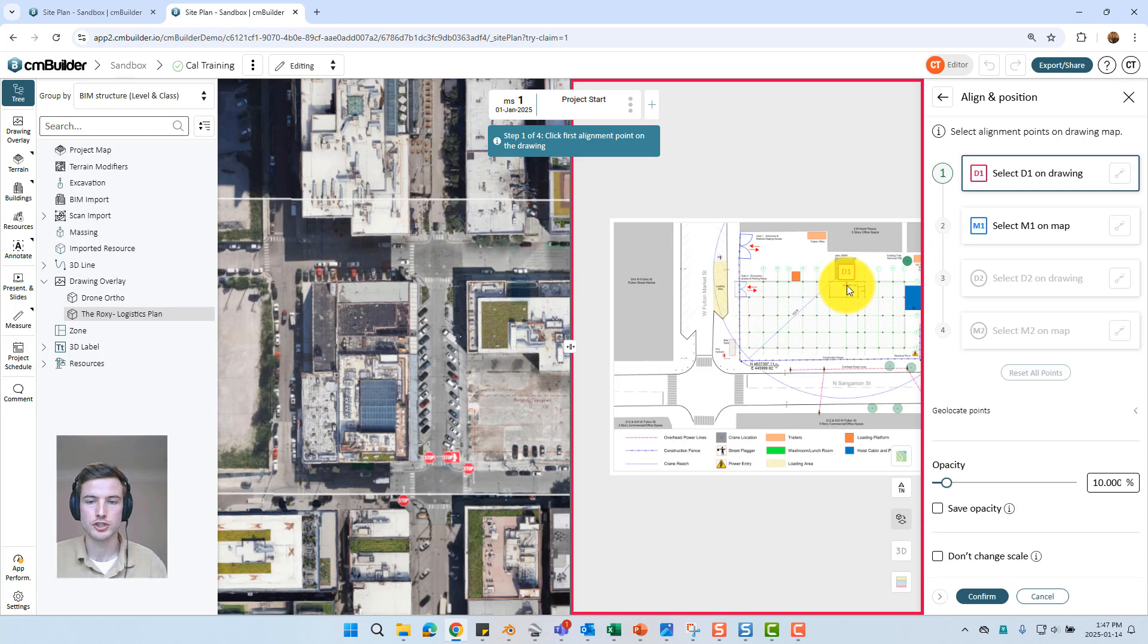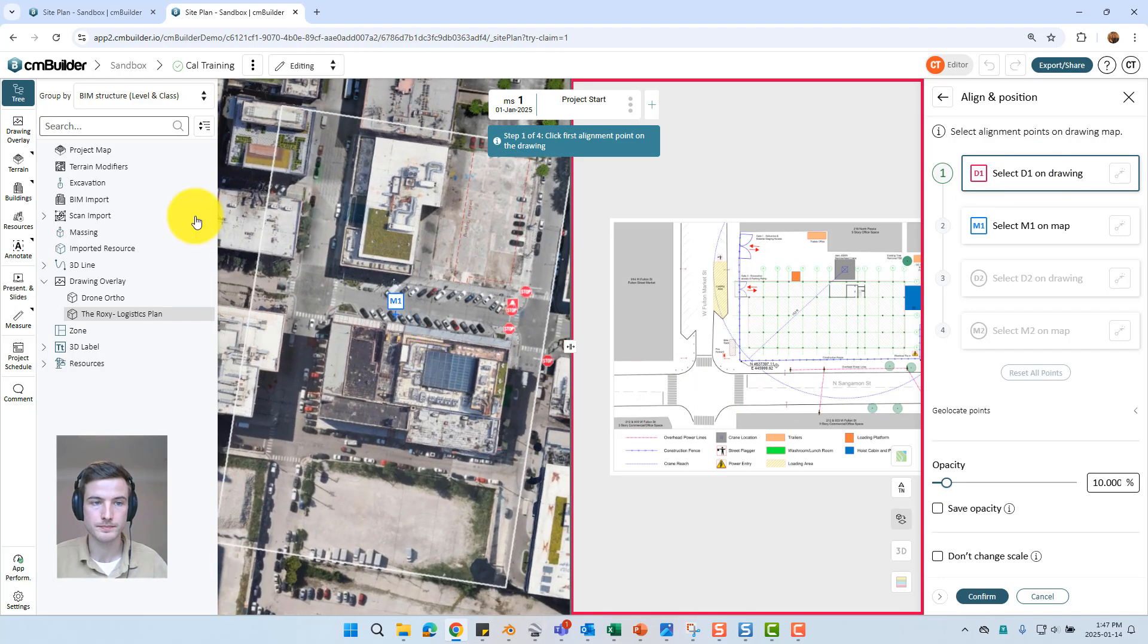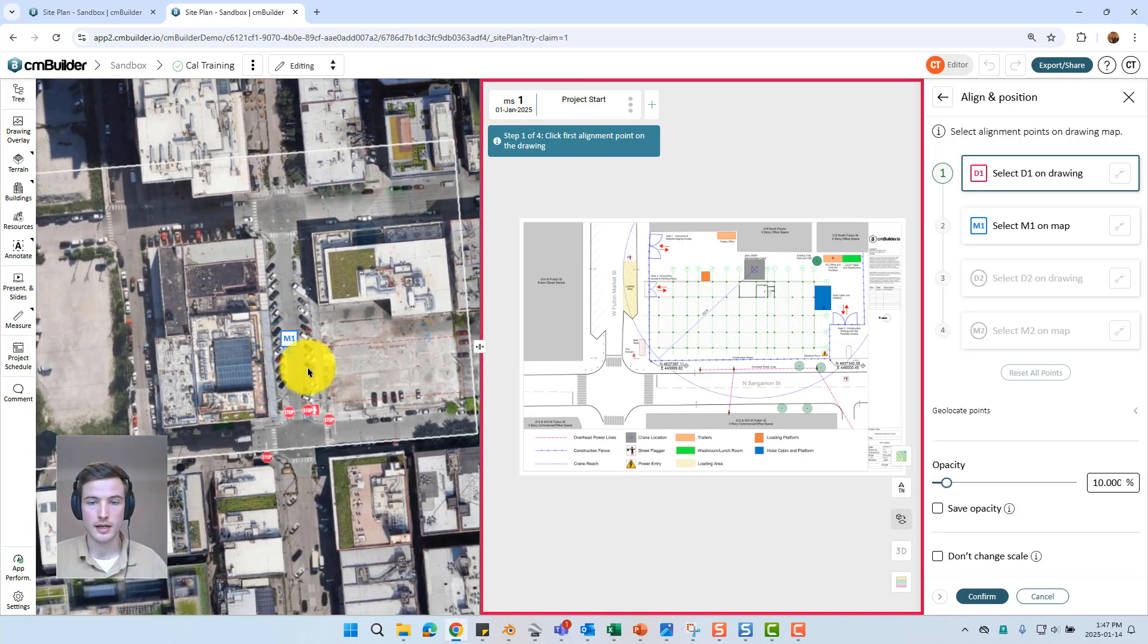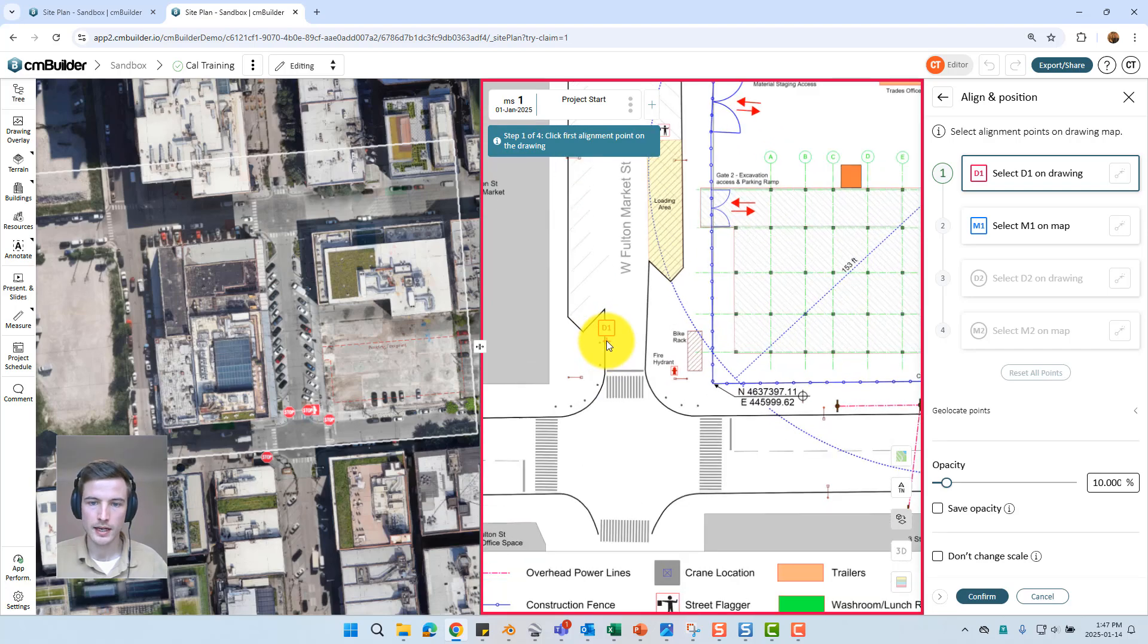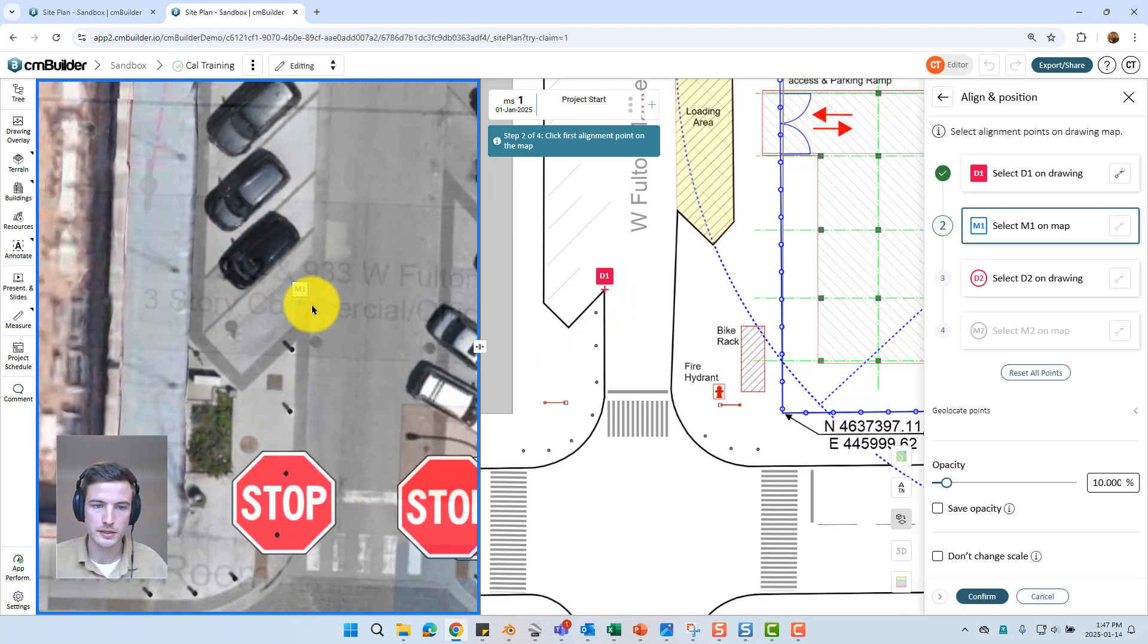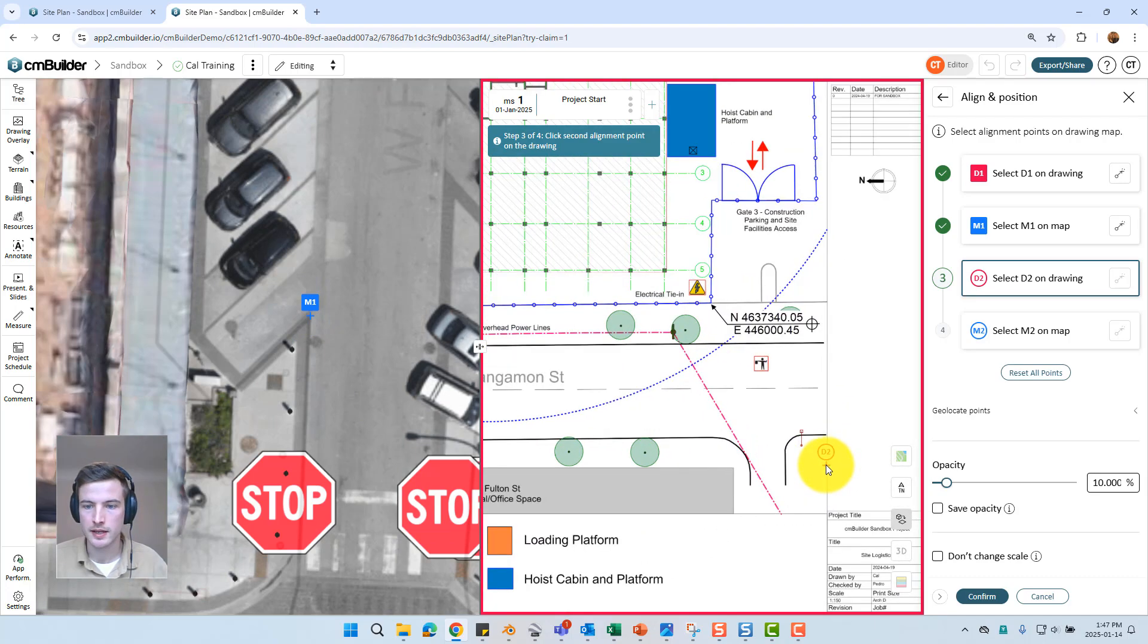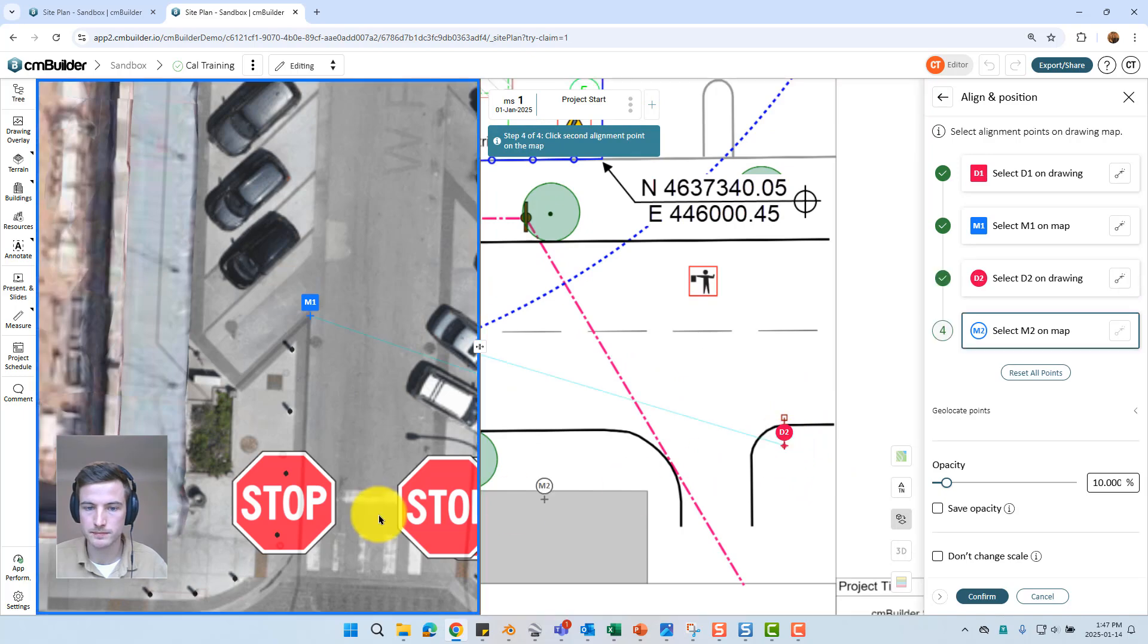Align and position is just going to walk you through selecting two points on the drawing which is shown on the right pane and then the same two points on the satellite image on the left pane. With those four points selected it's just going to scale, rotate and position your drawing all in one foul swoop. To demonstrate I'll just zoom in and you can see there is the corner of the sidewalk shown in our drawing overlay. And I'll just grab that same point in the satellite image on the left. I'm going to pan across site and I can see the street lamp down in the bottom right hand corner which I'll select.